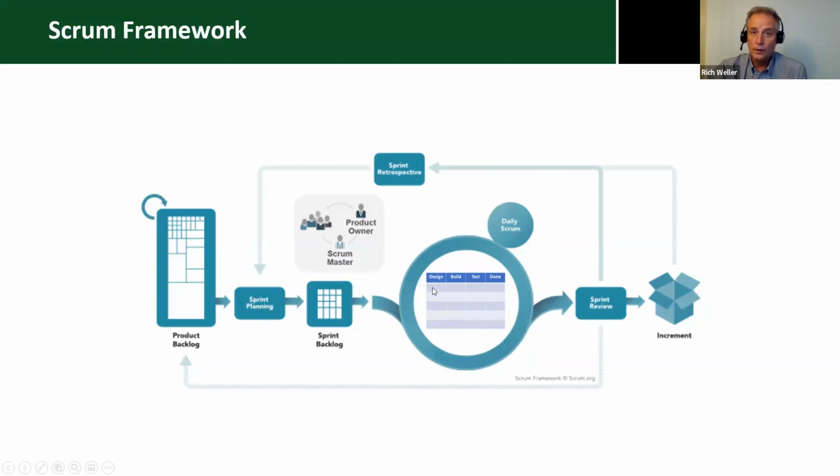And again, what we're trying to do is move these items out of the sprint backlog into the stages of the Kanban board and move them left to right through the stages of the Kanban board, basically performing the design of that item, the build of that item, and testing that item. And ultimately, upon approval, we're wanting to move that item or that user story over to done. And again, each day we conduct that daily stand up. And then at the end of the sprint, if we've done everything right, the goal is to have everything move to the done stage. Hopefully we can make that happen.